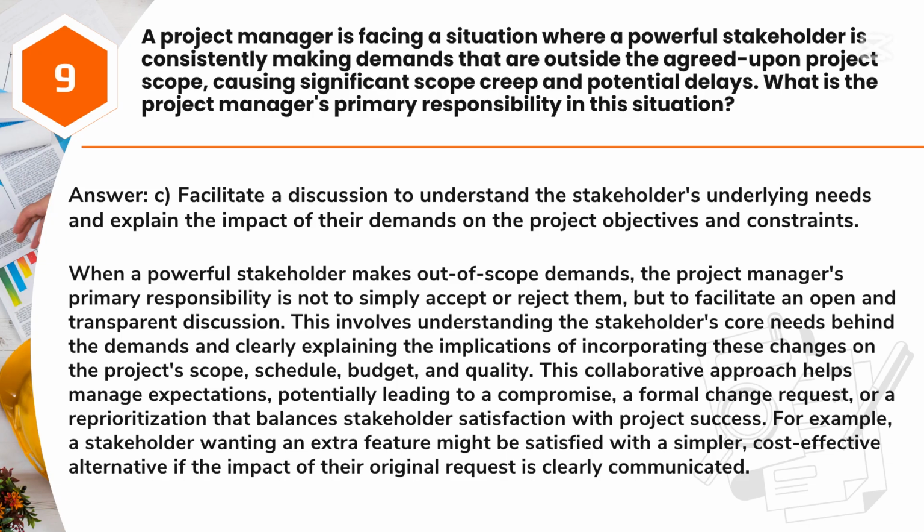This involves understanding the stakeholders' core needs behind the demands and clearly explaining the implications of incorporating these changes on the project's scope, schedule, budget, and quality. This collaborative approach helps manage expectations, potentially leading to a compromise, a formal change request, or a reprioritization that balances stakeholder satisfaction with project success.